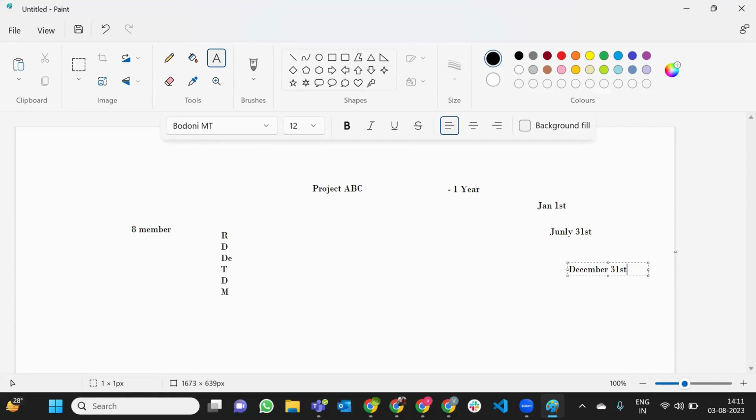Now, guys, if the client doesn't like it, what happens? You have to go back to the beginning, from scratch. That means an entire year of work will be wasted. Will you agree with me, guys? Yes. On January 1st, the client came, gave us some documents, and left. We started working on the project. We have done all the stages of the development. On December 31st, we delivered the product to the client, but the client is not at all satisfied. He said you have all understood the requirements wrongly, or he may say anything. If he doesn't like it, an entire year of work will be wasted. That will happen in the waterfall model, guys.